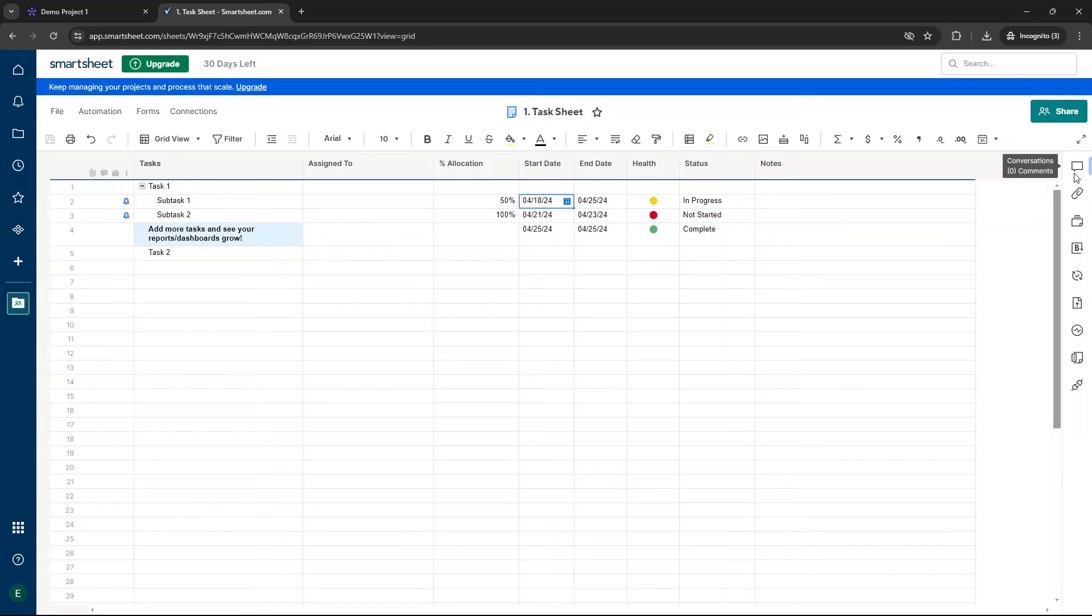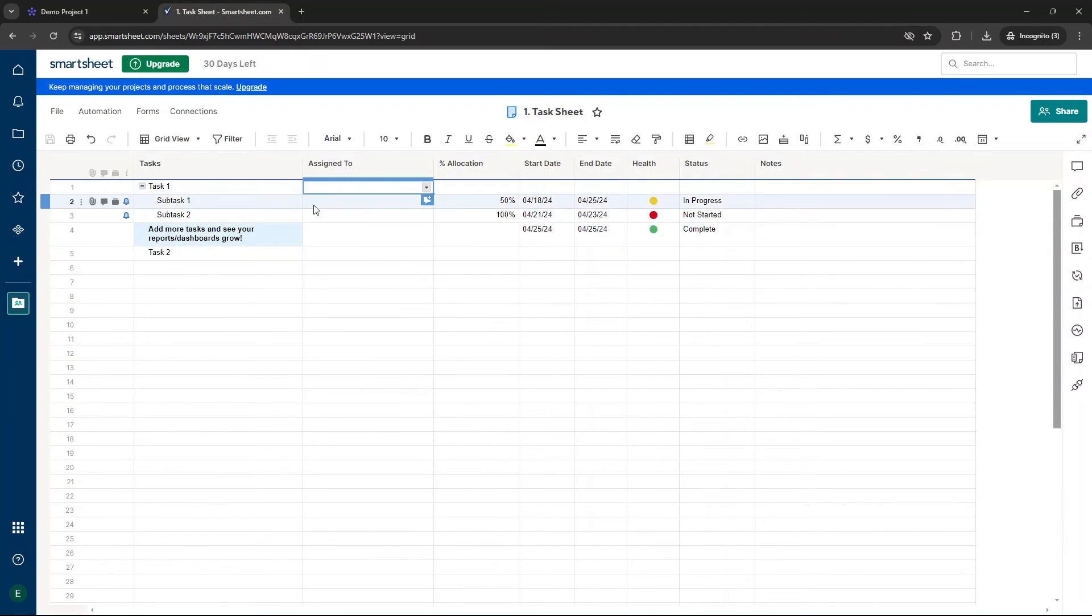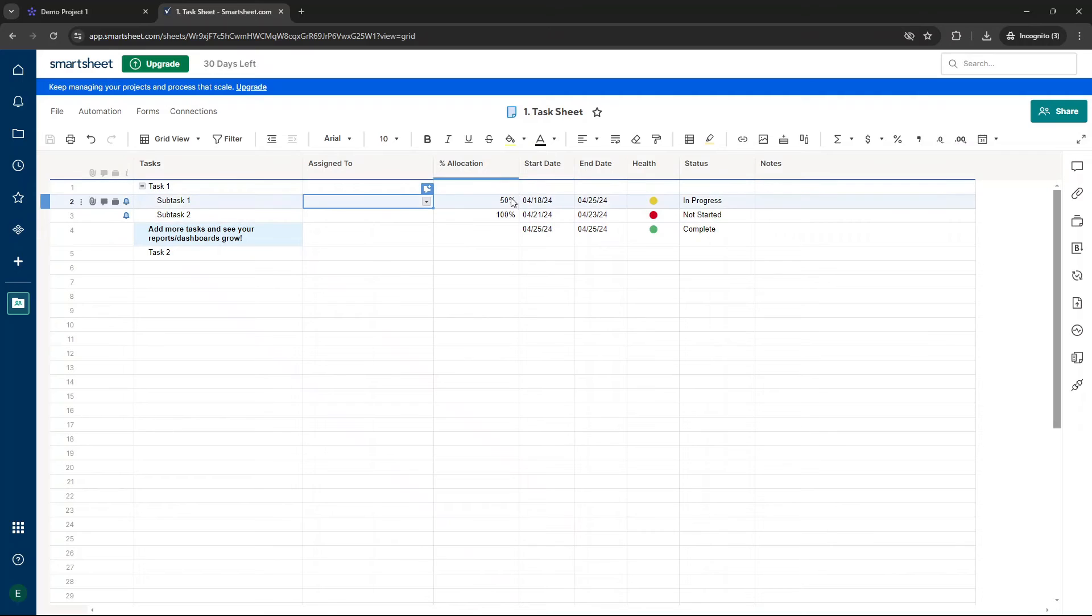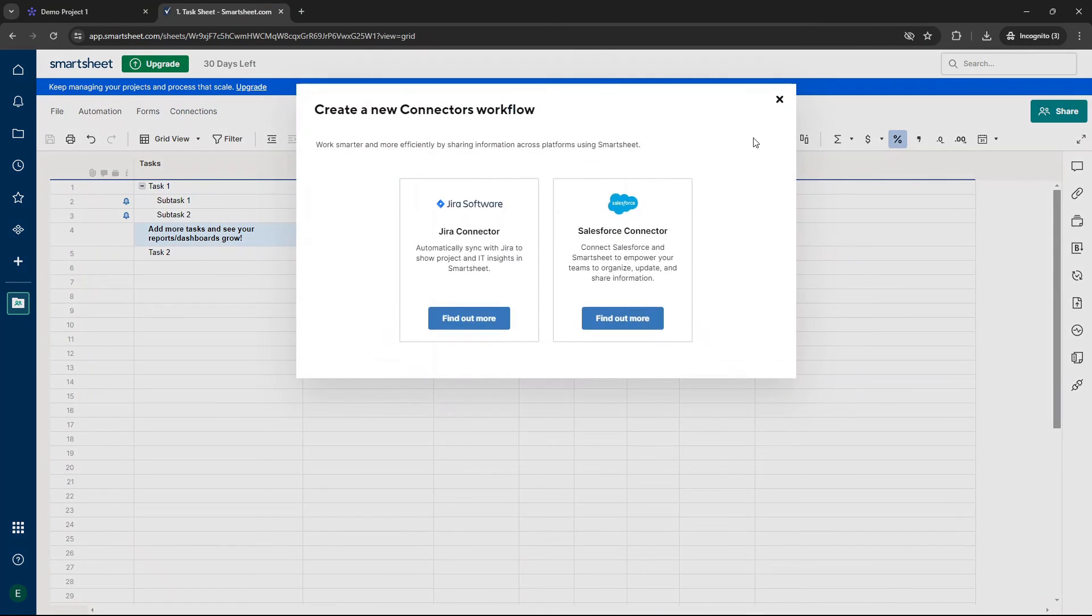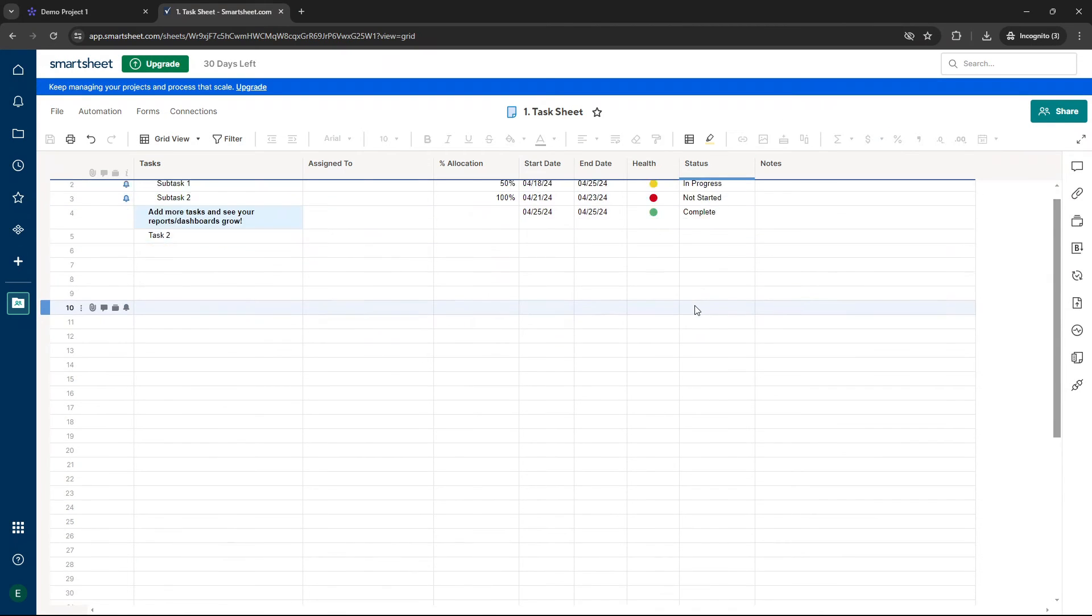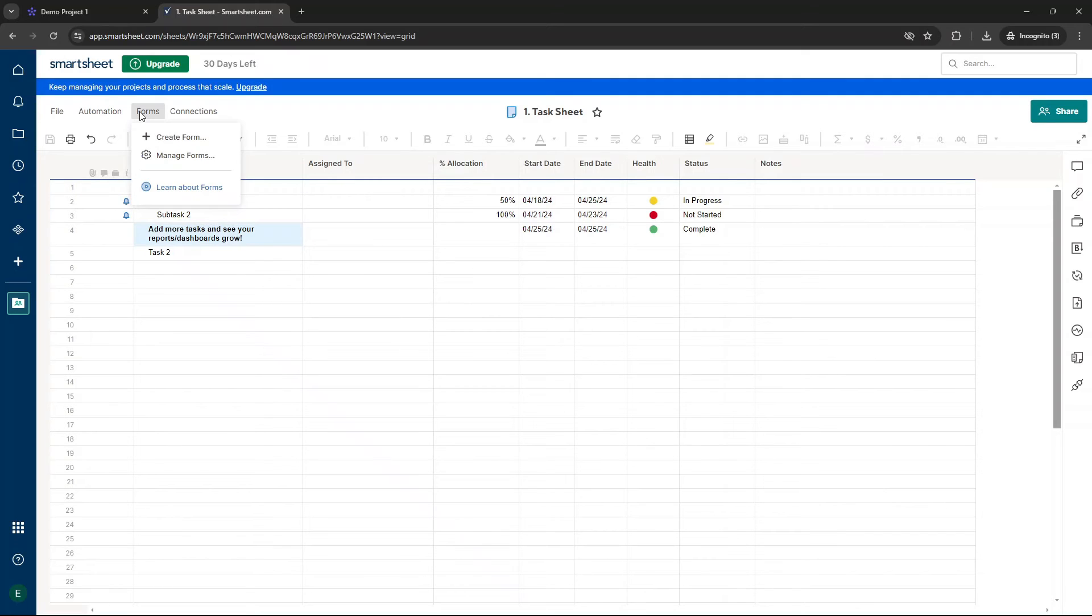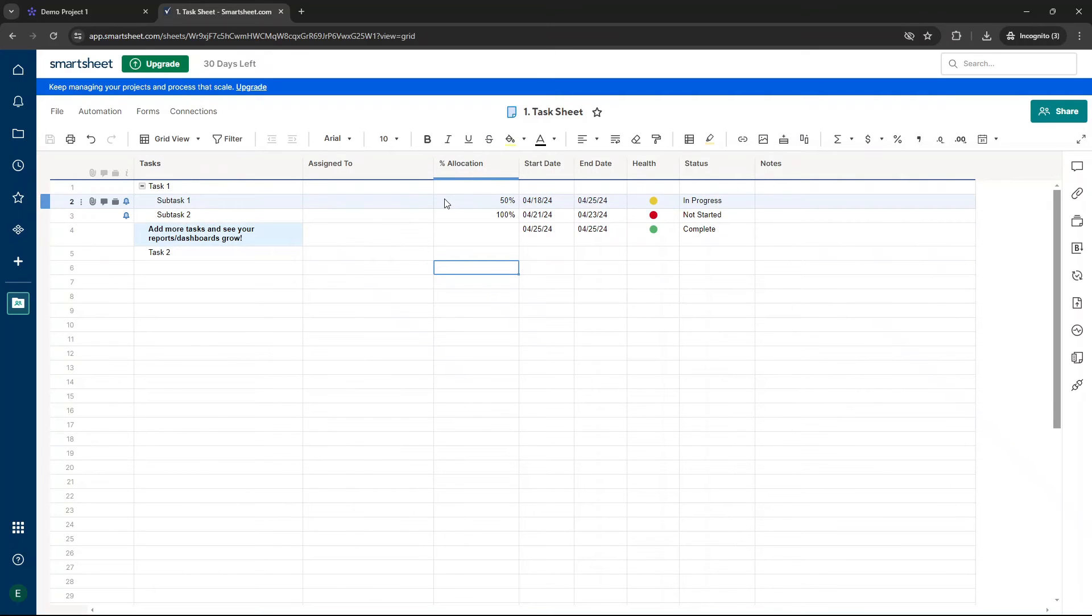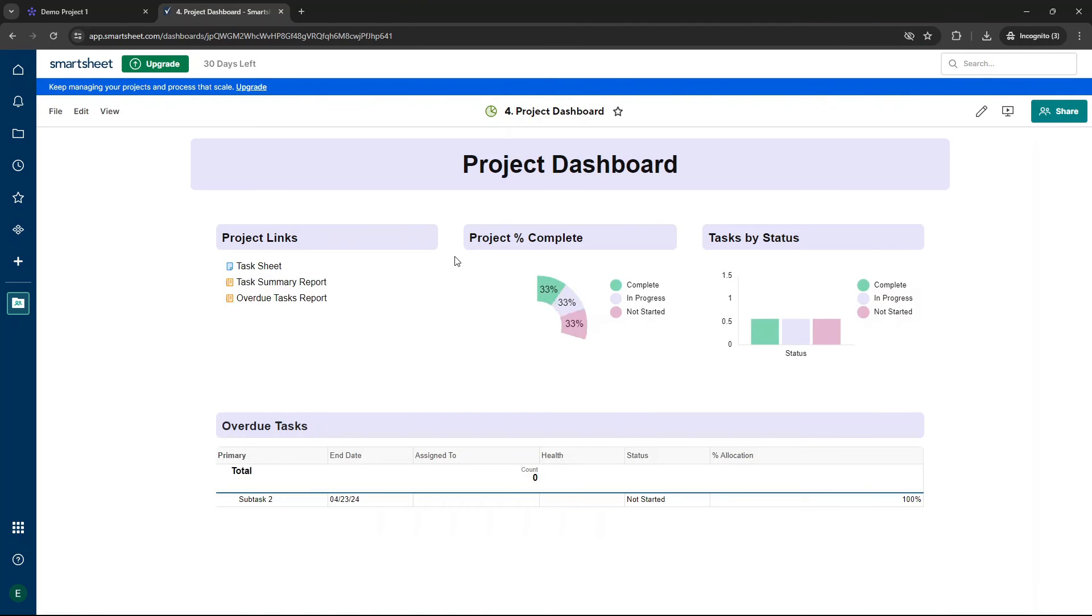You can also have conversations on individual sheets as well. Attach individual items to individual sheets or even individual rows. You can attach items to rows. You also have the ability to send update requests. So let's just say we needed, let's say Bob was assigned to Subtask 1. You could send an update request saying, Bob, we really need you to update the allocation column for Subtask 1 as an example. You have the ability to view the activity log. There's a summary and there's also this here which allows you to use different connectors to Salesforce or whatever system you're using. In terms of automation, you can set that up on the sheet level. You literally just create a new workflow via this button and you can also set up forms as well to collect information from different stakeholders, whether they are internal or external. You can also get a link to that form so they don't have to open up the sheet. They just literally open up the form in front of them.